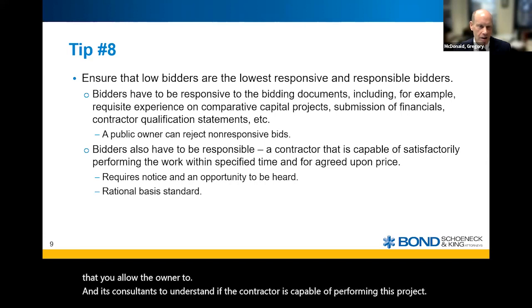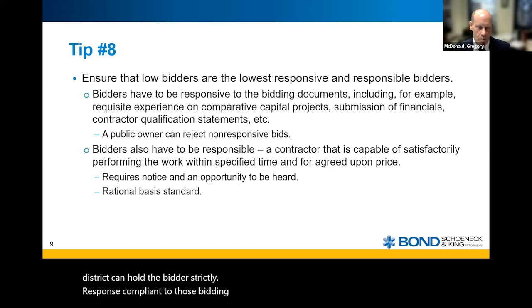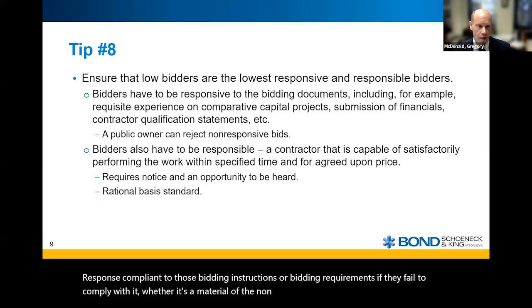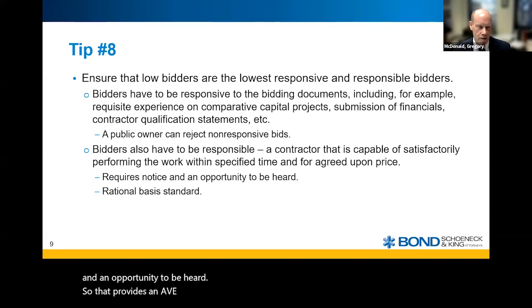And the thing about a responsiveness analysis is the owner or the district can hold the bidder strictly compliant to those bidding instructions or bidding requirements. If they fail to comply with it, whether it's a material non-compliance or a non-material non-compliance, the owner can reject the bid on a responsiveness basis without a hearing, without notice and an opportunity to be heard. So that provides an avenue to protect the interests of the owner.